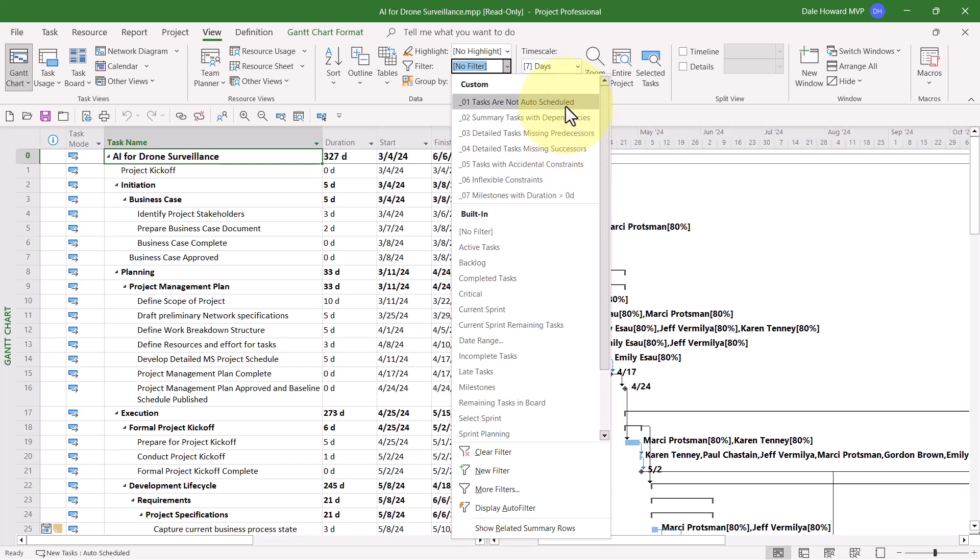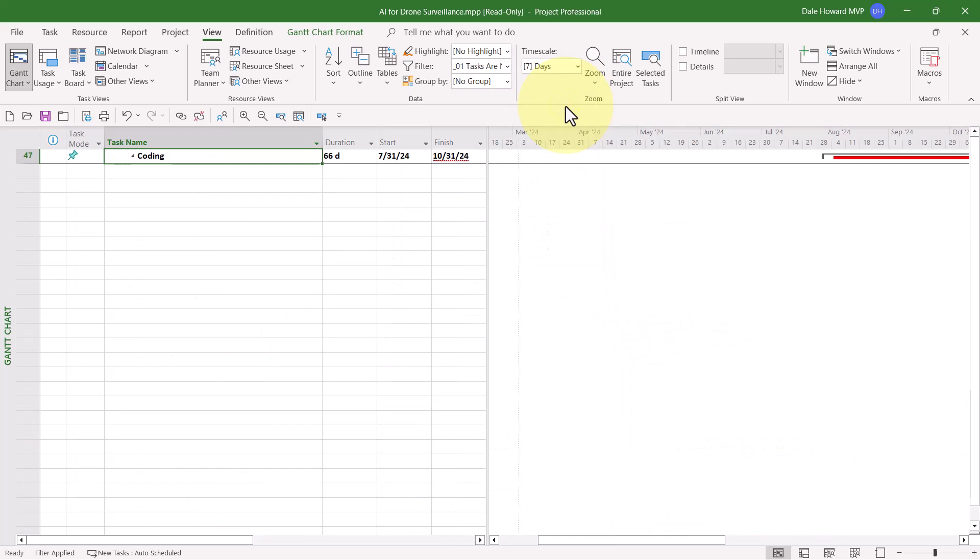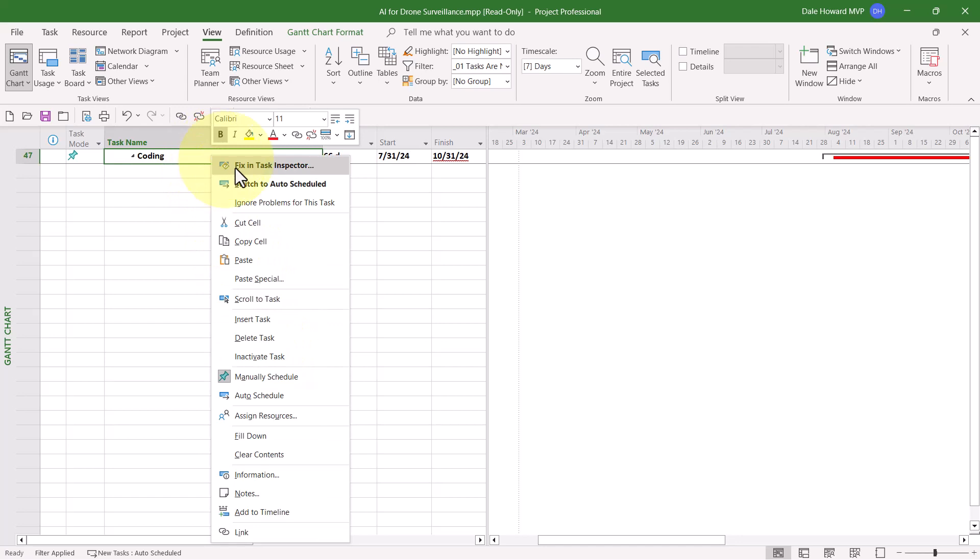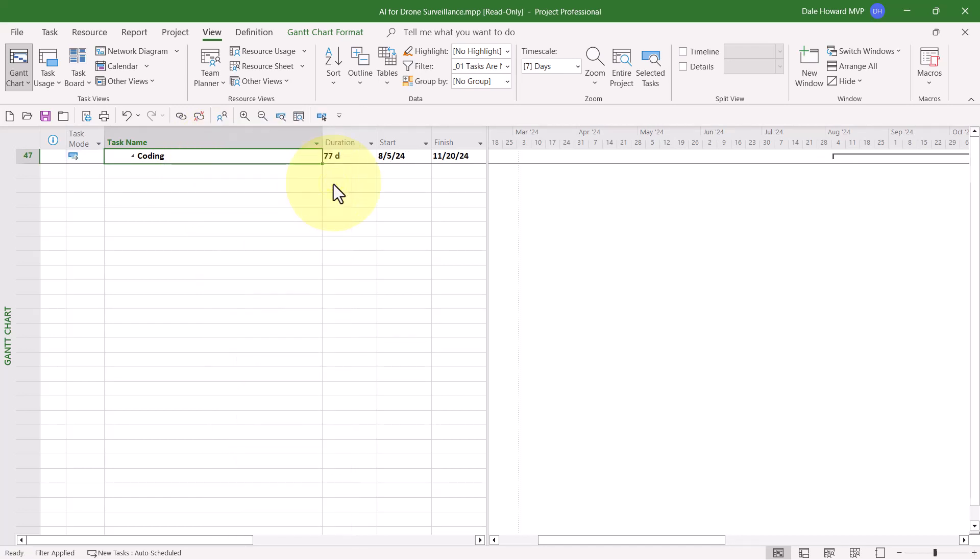Let's start with the first one. Tasks are not auto-scheduled. This filter is looking for any task that is manually scheduled. I have recommended for years that you do not use manually scheduled tasks because they are too rigid, too inflexible, and they require too much upkeep on the part of the project manager to keep the schedule correct. So if you see any manually scheduled tasks, right-click on the task, and on the shortcut menu, choose Switch to Auto Schedule. Now, after you apply that filter, fix the problems.